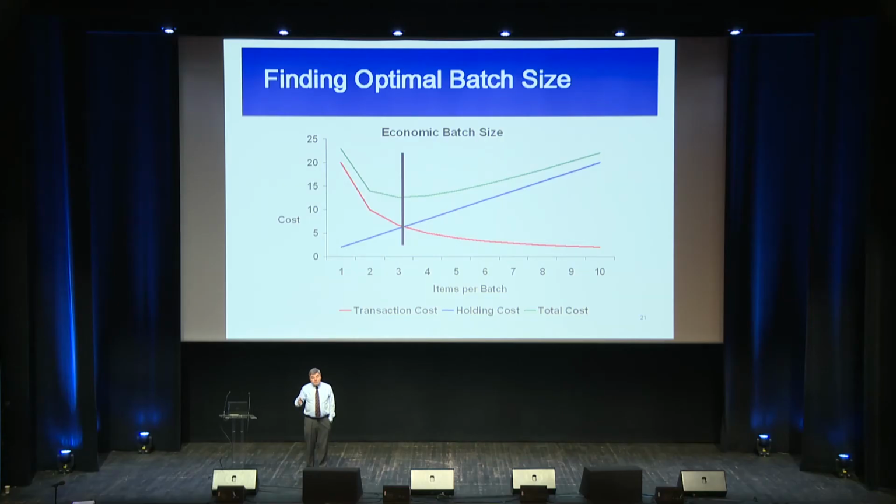And it's even safer because batch size has an undo button on it. And if you decide reducing the batch size didn't work, then you can move right back to your original, because you can reduce the damage done by driving down batch size. Whereas if you decide you need to hire 10 more engineers and then you decide that's a mistake, that becomes a much more complicated problem. So batch size and WIP reduction are two techniques that are so attractive to us managerially because they have undo buttons on them, and we can try something out and we can reverse it if it doesn't work.